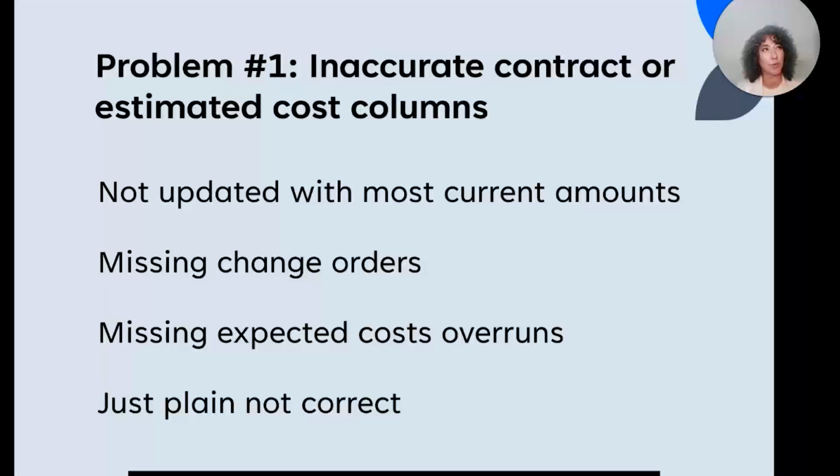Sometimes people will say, well, when is the right time to put a change order in? Oh, well, it's not an exact science, but you want to put a change order into your contract and estimated costs whenever you can reasonably estimate it and that you're reasonably sure that you're going to get it. Yes, it is subjective, and so you're using your best information.